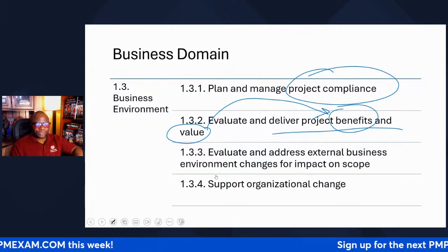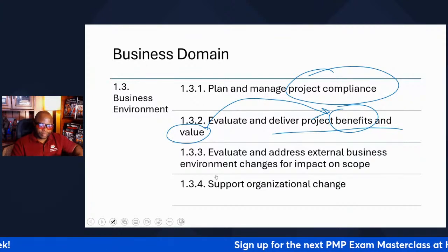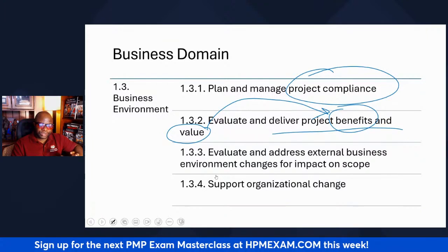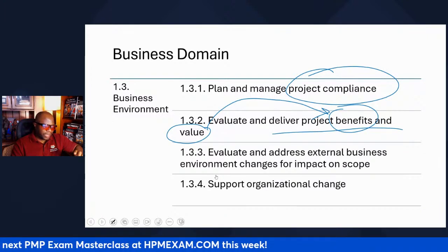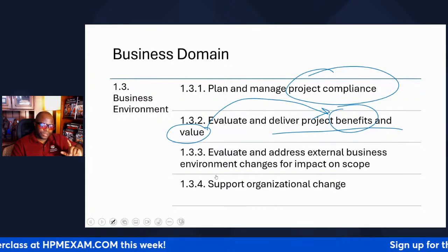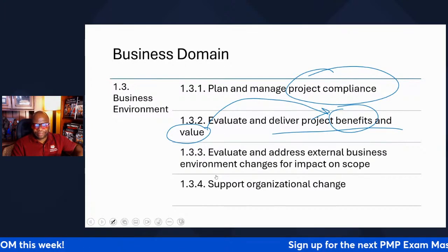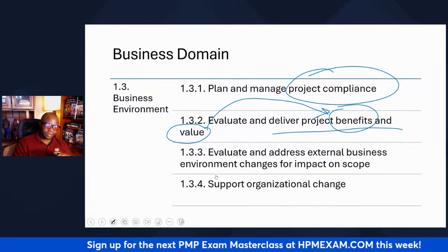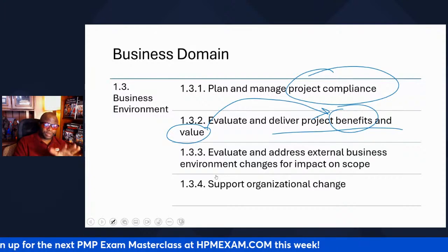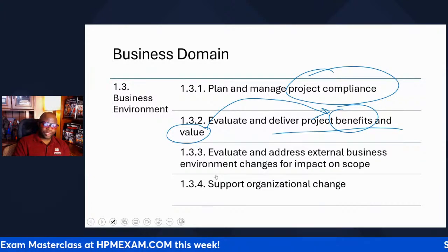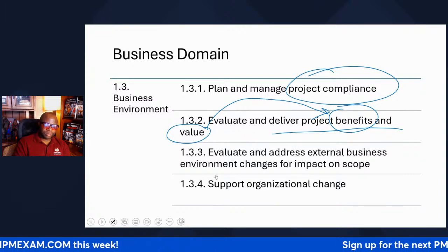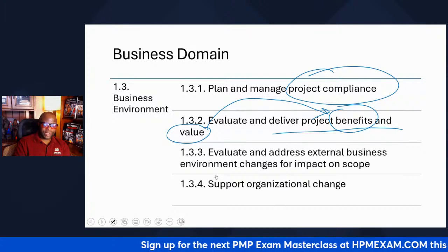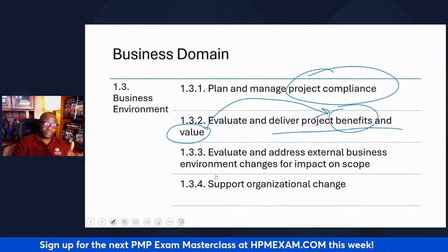Let's go on to page 33. Page 33 has a very important document in PMI's world, and not too many project management bodies talk about it, but PMI did a good job in bringing it to the surface. It's called the Benefits Management Plan. In a lot of projects, you do the project and everyone goes their separate way and they forget about the benefits. Honestly, in a lot of projects, the benefits are not realized. So imagine working millions and millions of dollars on a project where the benefits were never realized because you didn't chase them down and there was no one policing it. That's where benefits management comes in.